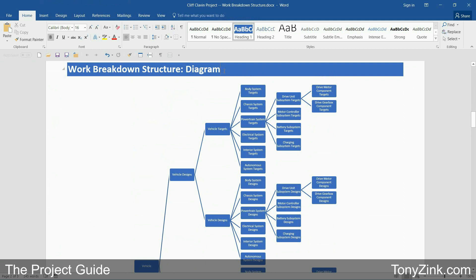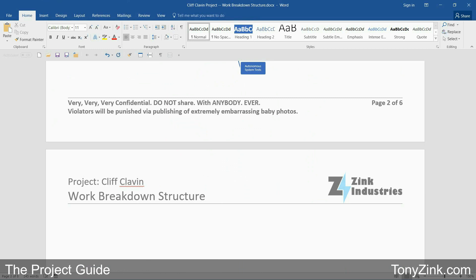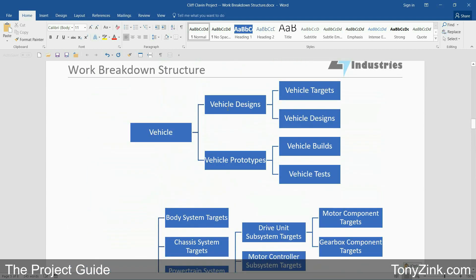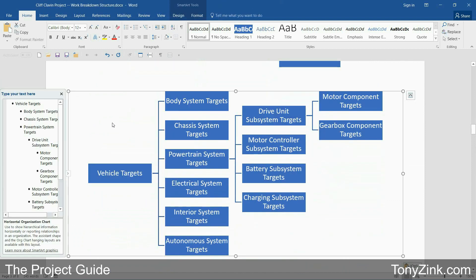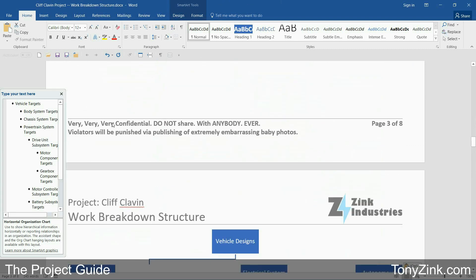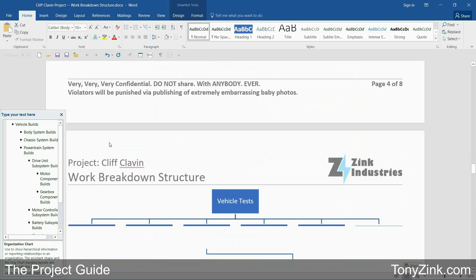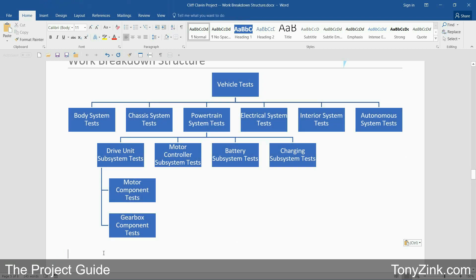Another technique you can use if your WBS diagram gets so detailed that it's difficult to read is breaking the diagram into multiple parts. Here's an example of the same work breakdown structure using multiple smart art diagrams instead of just a single diagram. The first diagram shows the key deliverables at the top of the hierarchy, and each subsequent diagram shows a further breakdown of each branch. This allows you to make each diagram larger and easier to read, and you can spread these diagrams across multiple pages in your document. You can use smart art diagrams that flow left to right or top to bottom.